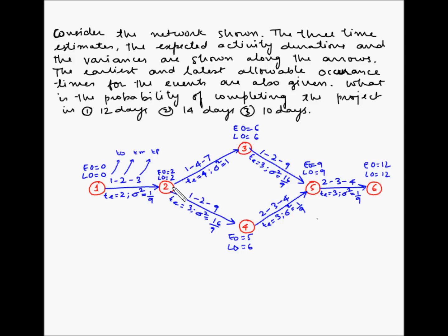For the activity between 2 and 3, 1 is the optimistic time, 4 is the most likely time, and 7 is the pessimistic time.